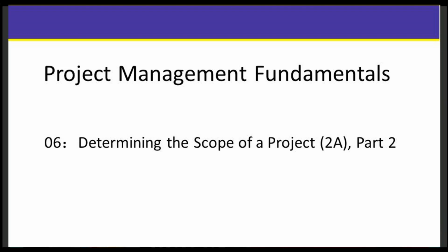That's right. And it's something that we will revisit. The scope statement, while we'll freeze it, so to speak, at the end of the planning period, we're going to try not to add anything to it through scope creep, but it's something that we'll come back to. Did we get this done? Did we do this the way we were supposed to? So it's something that we will revisit over and over again.